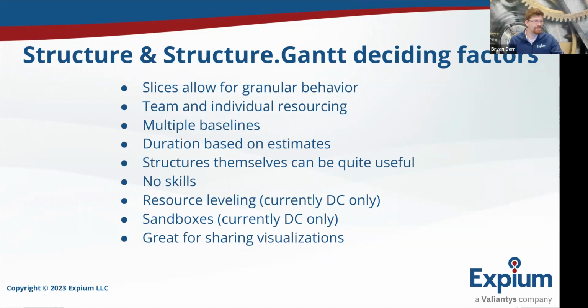You can do duration based on estimates. So unlike advanced roadmaps where the duration is just start to finish, you can set the duration based on the work estimate and the work calendar that it runs through. Structures themselves can also be quite useful.